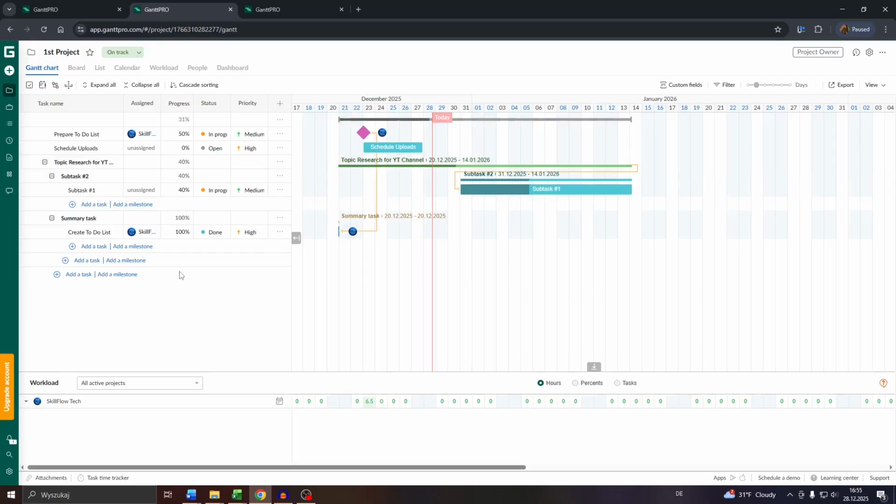And it depends pretty much on the view you're currently using. Let's say, for example, you're using the Gantt chart view for your project. This will give you access to that list of tasks below. And one way to mark them as complete would be to simply click into the given status cell here and switch from open in progress to done or closed. For example, if you created a custom status in your account settings, you can go with done or closed.